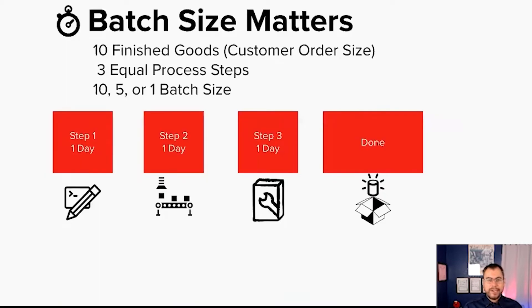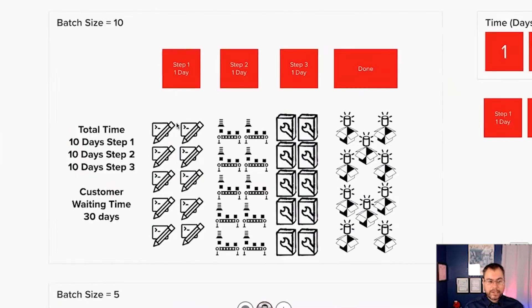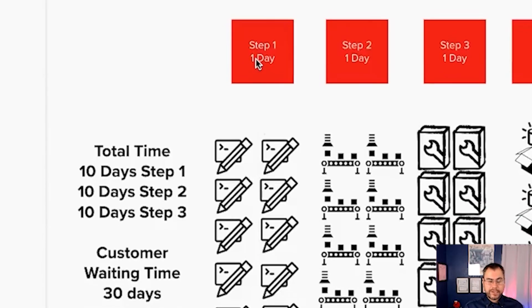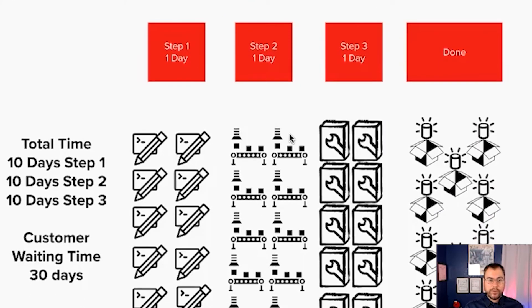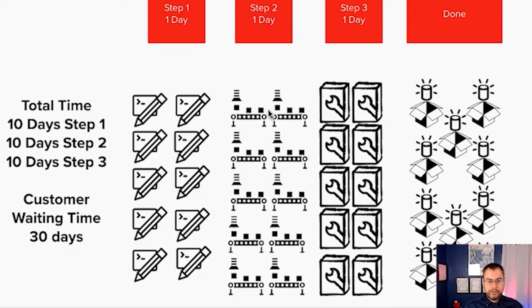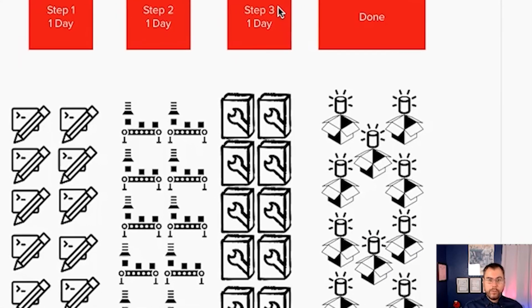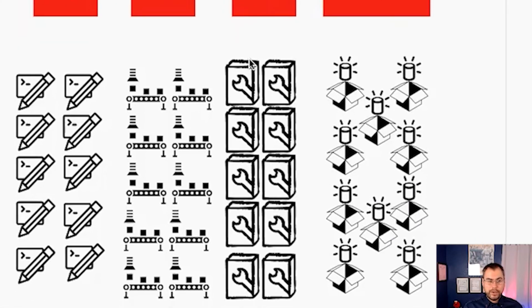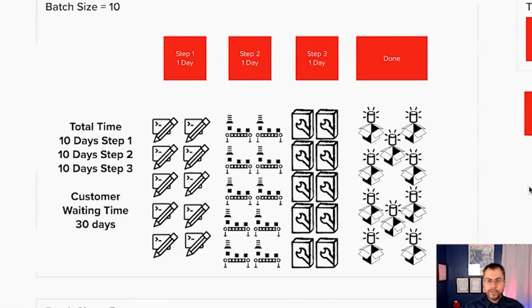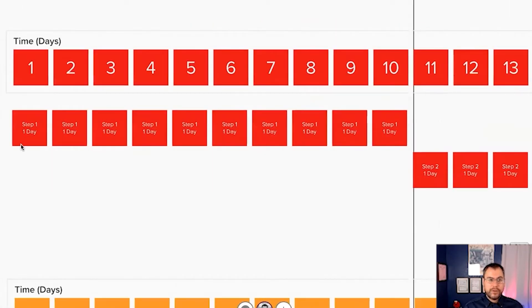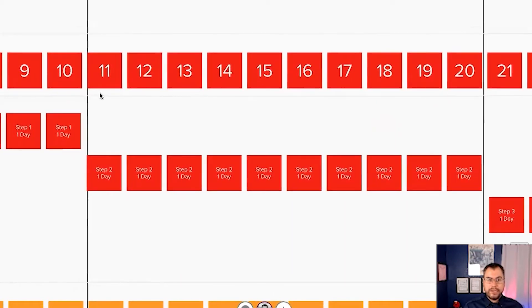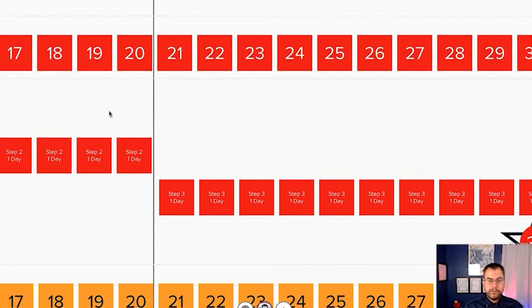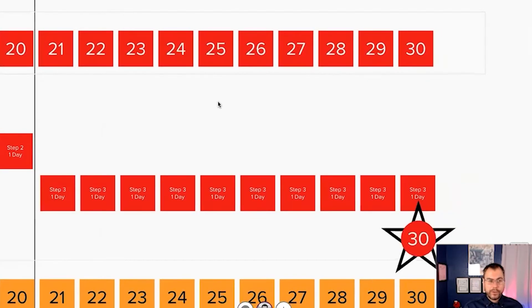Batch size absolutely matters. Three different types of work. A customer order of 10 finished goods. Each activity is going to take one single day. In this example, this step takes a day per unit of work. Step two takes one day per unit of work. So there's 10 days here, 10 more days here. And step three takes one day per unit of work. 30 days before the customer gets the 10 finished goods. What does that look like in the schedule? Well, there's sequence one going for 10 days. And we have sequence two days 11 through 20 for step two. And finally, they turn all that over for sequence three going from days 21 to 30.